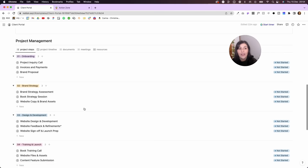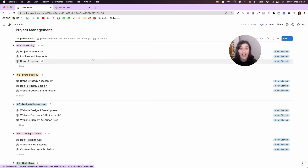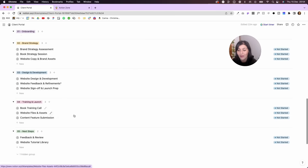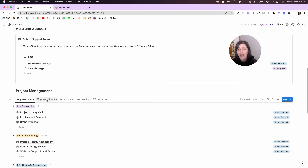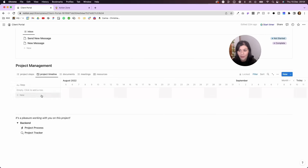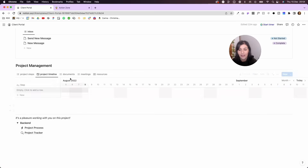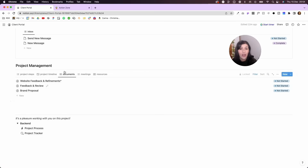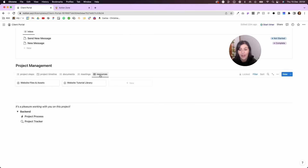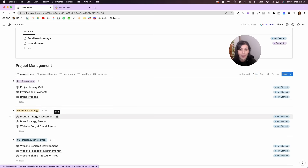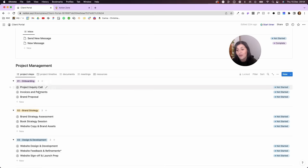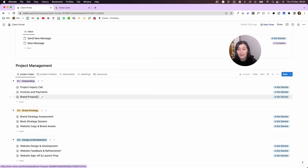If we come down a little bit you'll see a project management section with a bunch of different views. There's a step-by-step process broken down into various stages, a project timeline that appears once dates are added, and then all the documents related to the project, meetings, and resources. All of this is based off one database — we're just filtering it by what type of step it is, so for example invoices and payments would be a document.